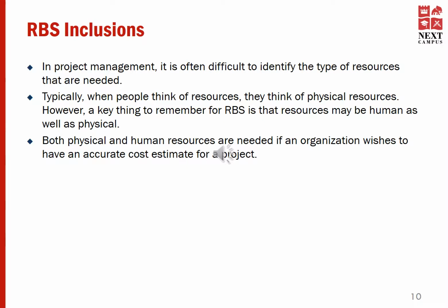Both physical and human resources are needed if an organization wishes to have an accurate cost estimate for a project. It's also important to note that only those resources that cost an organization money are included. Therefore, money is not included in this instance as a resource in resource breakdown structure.